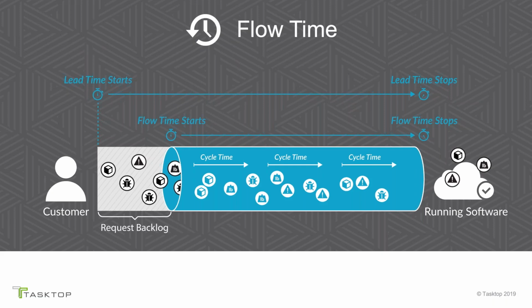But cycle time really relates back to that Barclays slide, that they are so agile in their development. If you look left and right of that, at the end-to-end process, that's really lead time. Some people track lead time, and lead time is when the customer says, I would like this new feature. And that's when lead time starts, and it goes until it is released into running software.